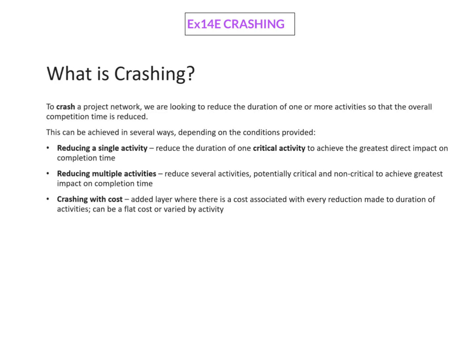So what is crashing? What we've been looking at is the network and the critical path. Remember, activities cannot be done unless the activities before it are completed. We've been finding the critical path, which is the earliest time that we could finish the whole project. Now we've got that time, but companies will say, no, we want it done quicker.